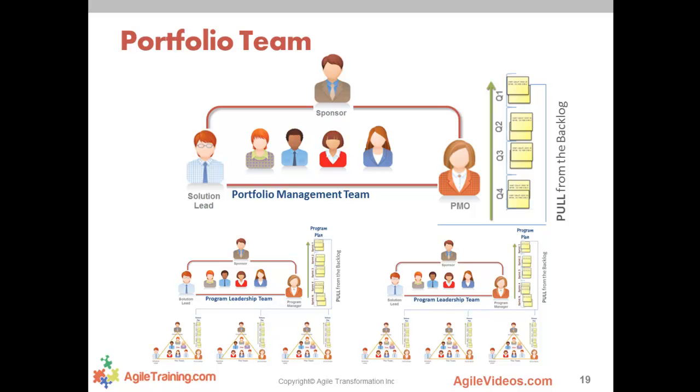And some of you may say, well, I don't need to do that. I've got my priority list and it's clear within my own portfolio team. I don't need to work with the other portfolio teams. Okay, sure, I'll give you that if you don't have to use the same resources. If you're fighting over the same IT resources or whatever resources, if you're pulling from each other, then we do need to know what is the number one priority. Is it your project or that project? If you've got stable teams that are completely dedicated only to your portfolio, then yeah, okay, great. Your number one priority is going to get done and you're not going to have to worry about some of the other teams. In all cases, having an enterprise portfolio management team is really important because every organization does need to know what is truly number 1, 2, and 3.